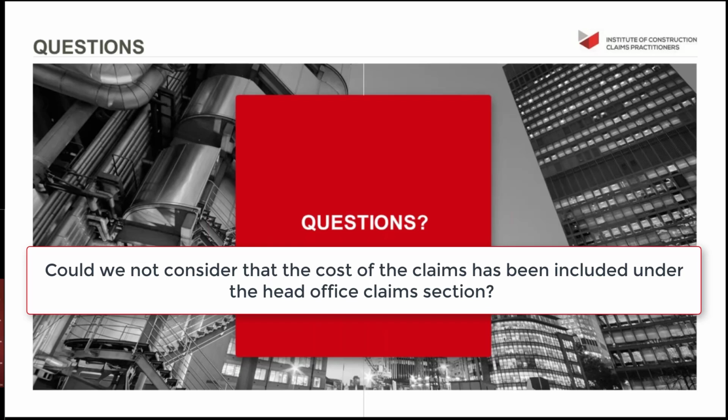And my advice would be, wherever you include them, back up with the cases that we've seen today, where you can argue that, hold on, Walter Lilly versus Mackay, assuming you are in a common law jurisdiction, that's always the proviso, says that it is possible to recover them.